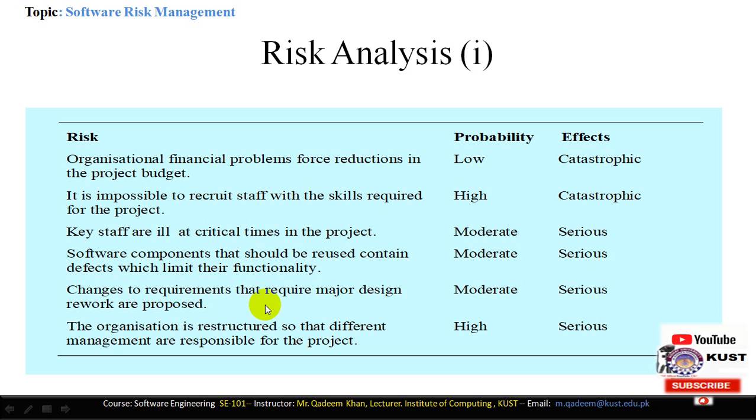Changes to requirements that require major design reworks are proposed. When we want to change the requirements, major rework is proposed. That means that suddenly the customer comes with some new requirements. The occurrence of this is moderate and its effect is very serious because we have to rework the full project again.